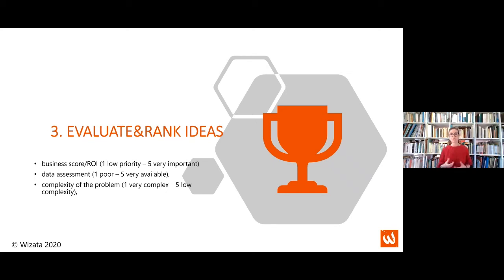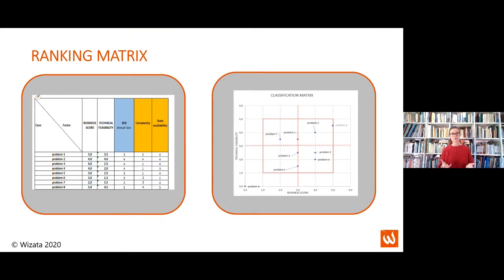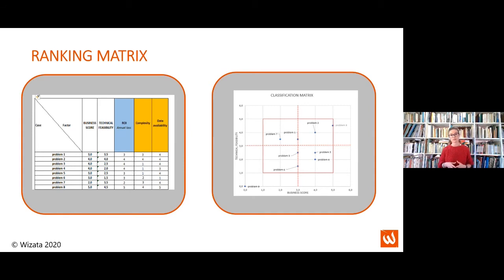Instead, try to focus on something small — like an equipment that is malfunctioning or a specific product causing quality issues. Always keep the scope limited. The ranking matrix shows, based on your evaluation scores, how complex each idea is. Ideally, you want to select a project in the top right quadrant — very high business priority but low complexity. If you'd like me to share this template, feel free to ask after the meeting.